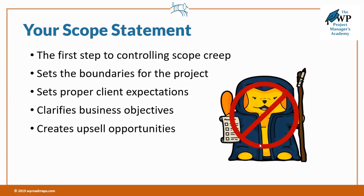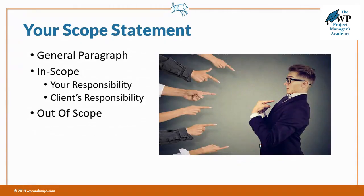So what should this scope statement look like? It's broken down like this: you've got a general paragraph that comes from your business requirements discovered during the pre-proposal discovery. Your in-scope section comes from your project plan template — those are the activities you're going to complete. I also break the in-scope section down into two subsections: what's in scope that I'm going to do, and what's in scope that the client is going to do. This helps educate your client and set the expectation that they have to be involved all along the way.